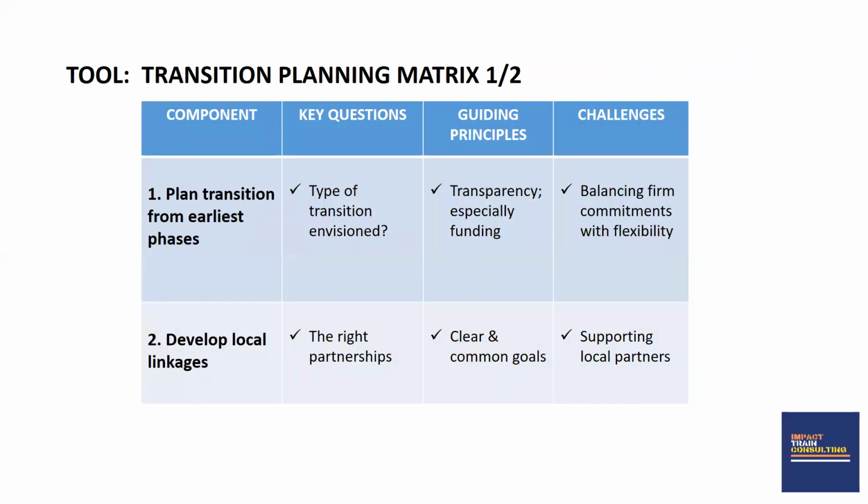The transition planning matrix is a tool that will help you to prepare during the transition phase. One of the things you have to look out for is that you need to plan transition from the earliest phases. From the very beginning, perhaps during the identification and design phase, you need to begin to think about what type of transition we envision.